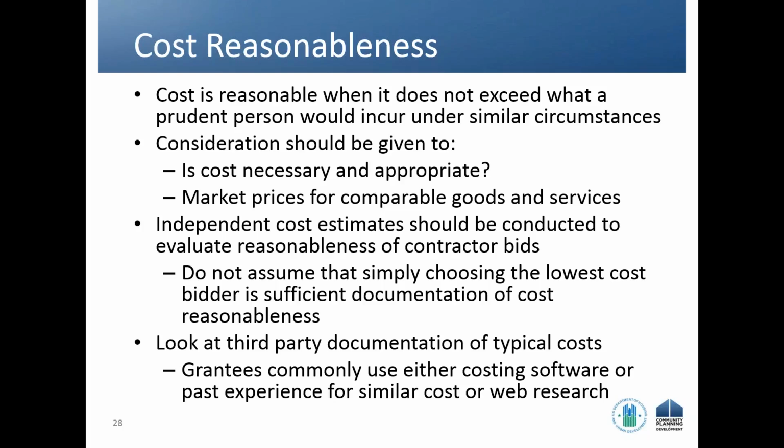And if there is that mismatch that I talked about, you then either have to reissue the RFP because there was some confusion, or you have to look at whether there was an error in how you calculated your cost estimate, but you somehow have to resolve this. If you're not doing an RFP, maybe you're just paying for costs for a developer. A developer is coming in and he's going to build some rental housing, giving you a bill or telling you it's going to cost him however much for the roof. How do you know whether his development budget is reasonable?